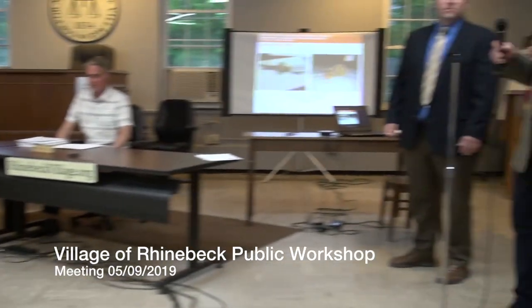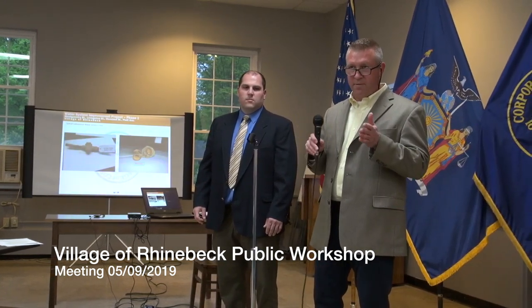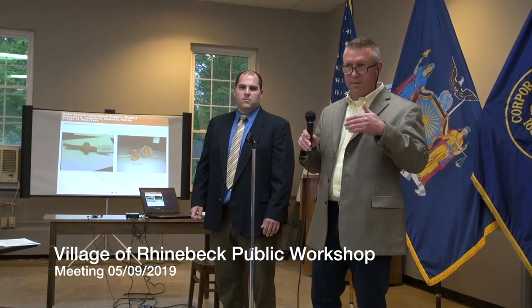The new water main gets installed and charged and serving people connected to it, but at the same time the main that's there now will still be live as well. So there's going to be a period of time where the new main is operational, the old main is operational, to make sure that there's enough time for residents to.